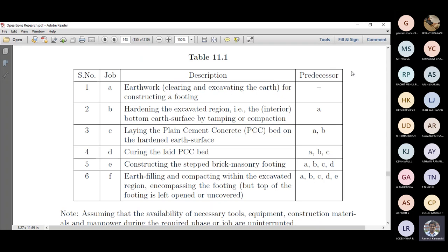I'm currently explaining you with a simple example. You don't have to replicate this, but instead you have to take up a project or a process which comprises a minimum of 25 activities. You need to define the dependencies, create a project network diagram, and solve that using critical path method. It's almost a unique project. Uniqueness is valued more in digital assignment number two.